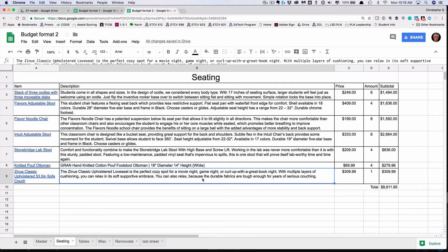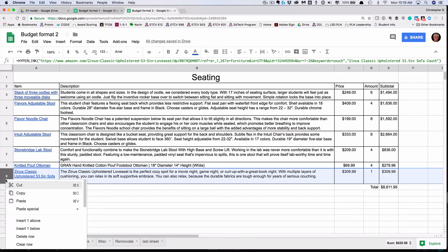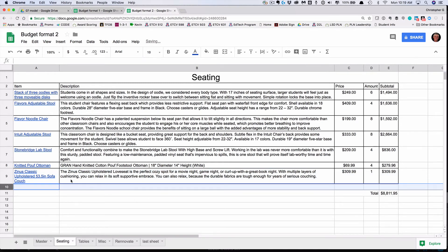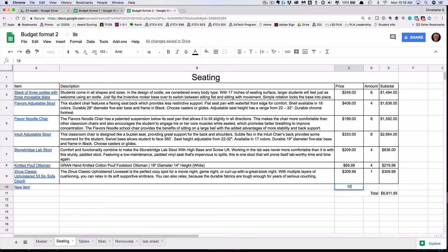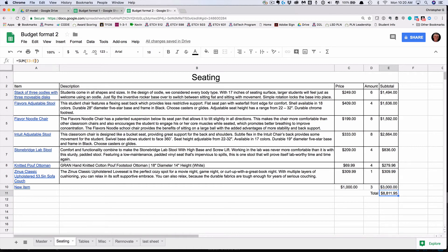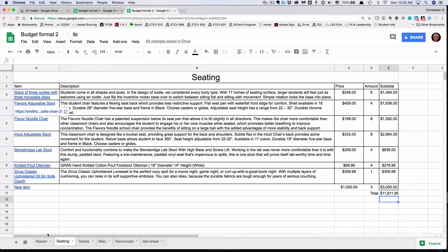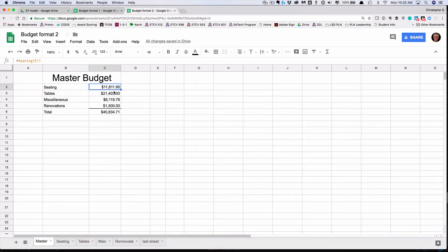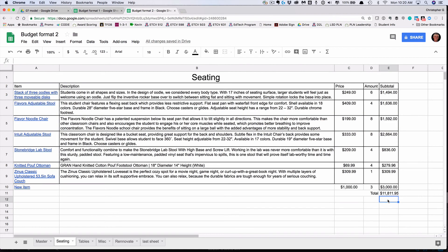The last thing I have to be careful about is, let's say I want to add another item. I'm going to right click and insert a row below for a new item. It's $1,000 and I want three of them. I can come over and type my formula in or drag the square down and I'll get my new amount. But notice my total didn't change. So I've got to come back up and update this to be E10 because I have a new row. Fortunately, the master sheet is smart enough to know that I added an extra row, so it updated seating from E10 to E11. Just be careful if you're adding new items to make sure that you check the subtotal to make sure it's updated as well.